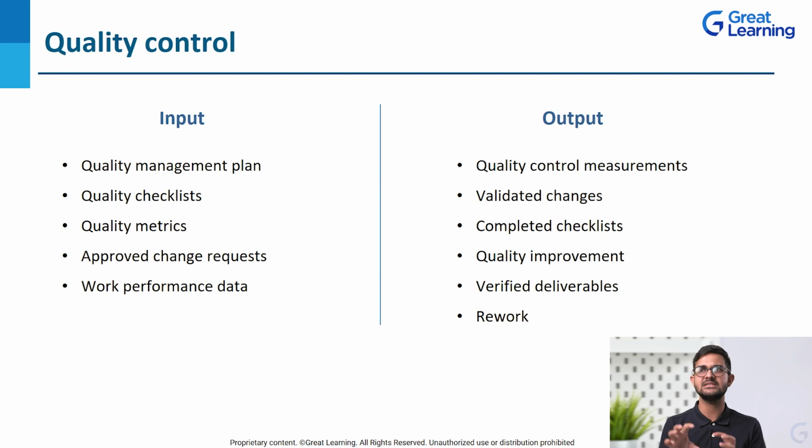But in certain cases, maybe a part of the project where we have missed something, rework can also be an output of quality control, because we'll find out that this was a major difference between the specified needs and the requirements that we had tried to complete. So if the mismatch is huge, we will have to do the rework also. That will definitely waste your money, time, and energy. So make sure you start with quality planning. A proper plan should be ready.